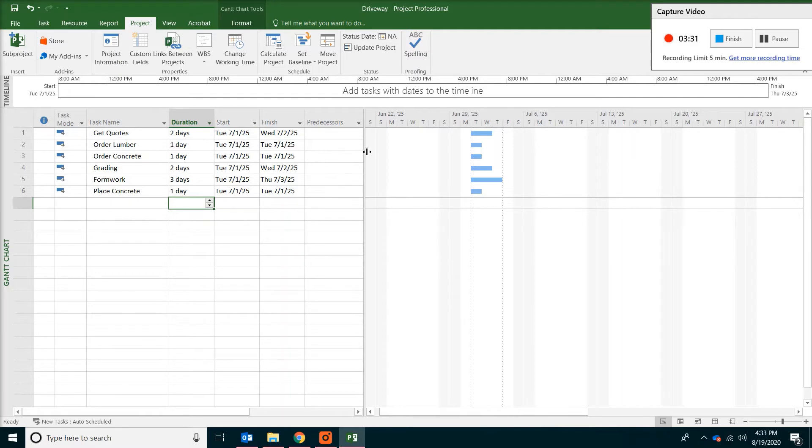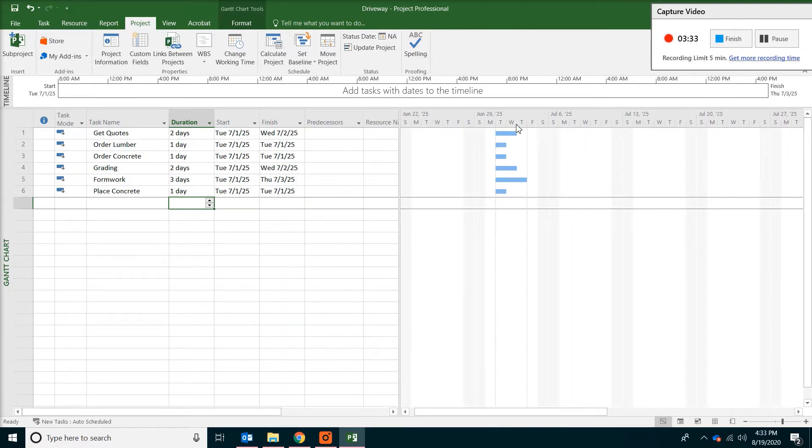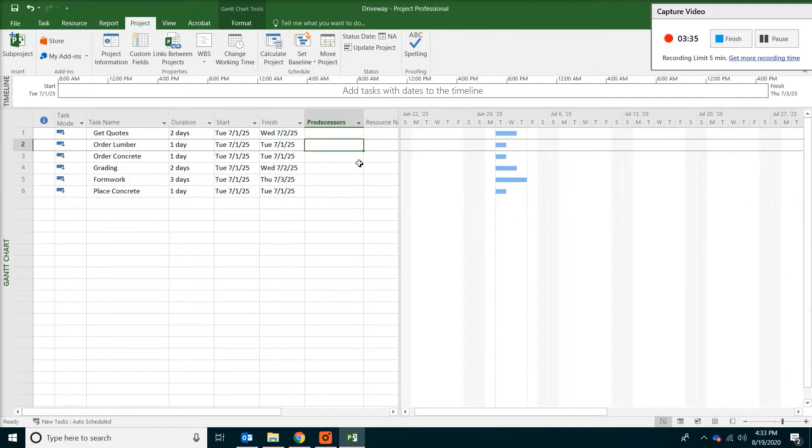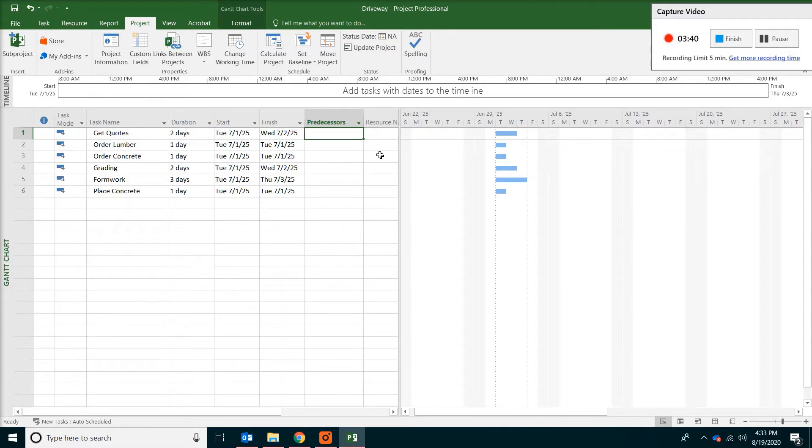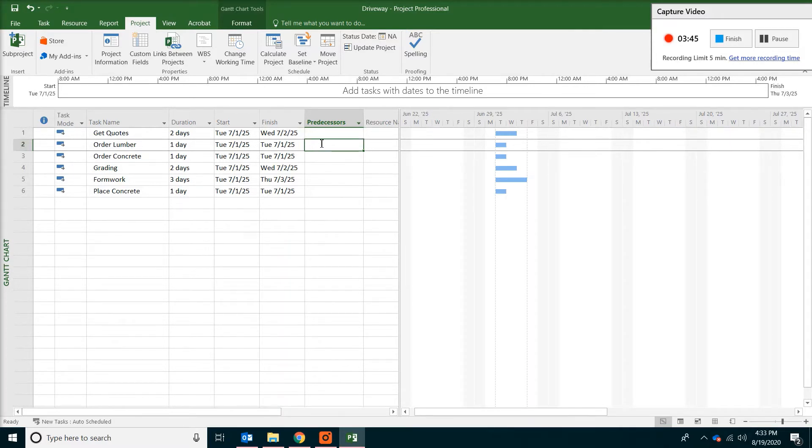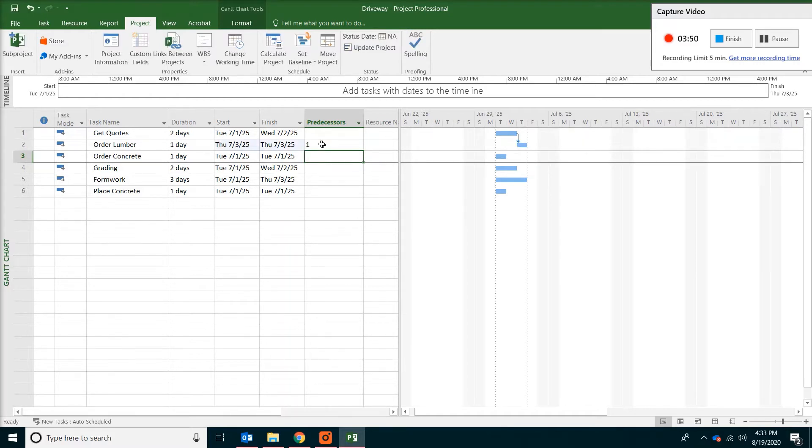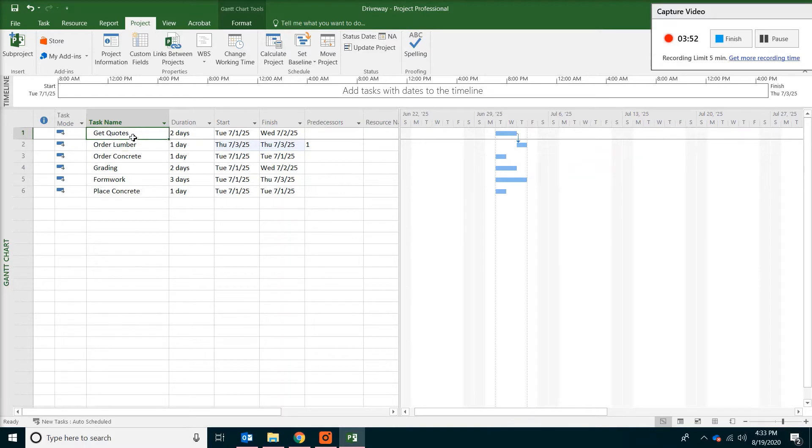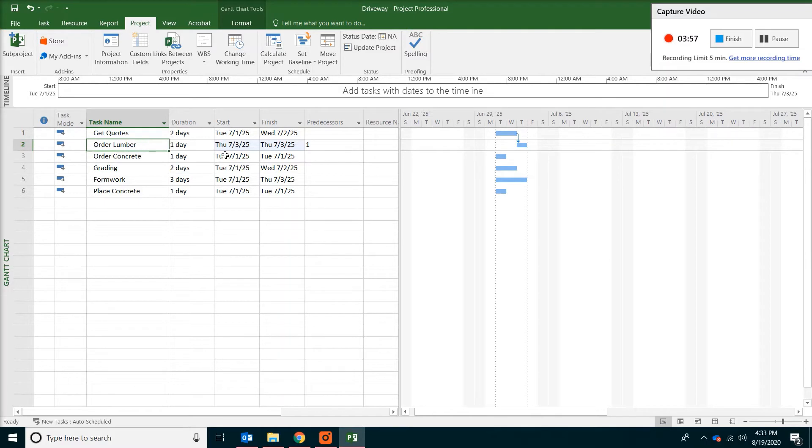Finally we are going to look at the relationship of those tasks. And the first one is the get quotes. Get quotes will be the first thing we do. So you don't have to put anything here. Order lumber. For lumber you put a one. Which means get quotes activity one happened before activity number two.